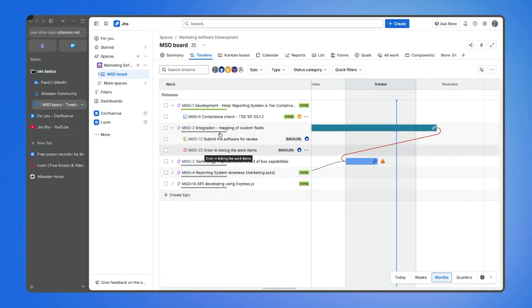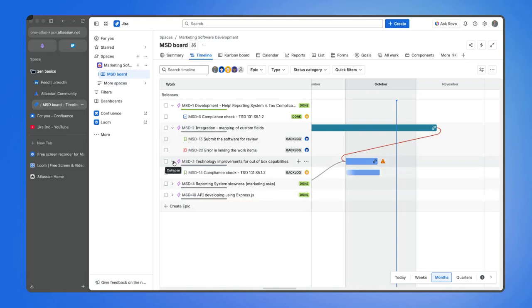So these are interconnected, but out of the box, if you want your parent work item to be really connected with this, in terms of, if all of the work items have been completed, then this item needs to be transitioned into done, that is something you do within an automation rule itself. So this is not something that comes out of the box.